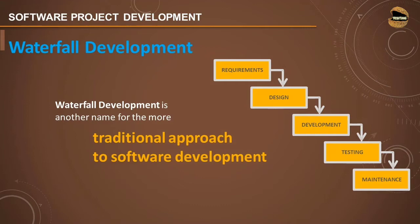Waterfall development involved a sequence of phases which helped create a product and deliver it to a certain extent. The waterfall development included certain standard phases — requirements, design, development, testing and maintenance — which were supposed to be completed at their desired positions before moving to the next stage. As you see in the diagram, it was a waterfall: moving from one stage to another, and you cannot go back. The permission to revisit a previous stage was not actually allowed.